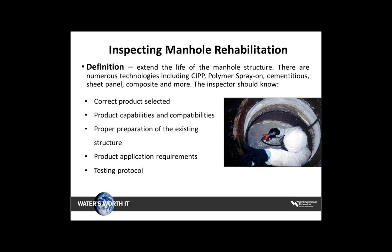Condition of existing pipe is similar to other technologies — it's important to understand that the pipe has been prepared properly before the product is installed. Processing or curing of the product is something the inspector needs to verify. Correct line terminations and long-term sealing mechanisms, if required for infiltration control at the junction of the laterals and the mainline, are extremely important to verify that the product will meet the requirements of the contract specifications. The proper testing of each application — whether the casting, chimney, or bench — are things the inspector needs to understand when out on a job site.